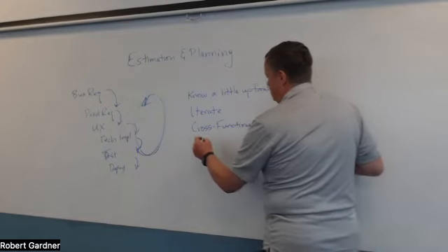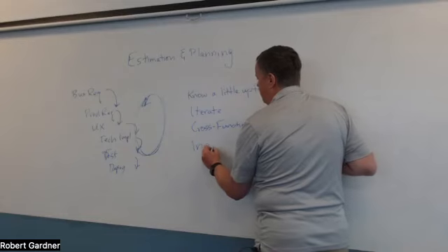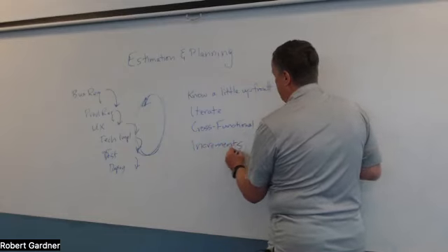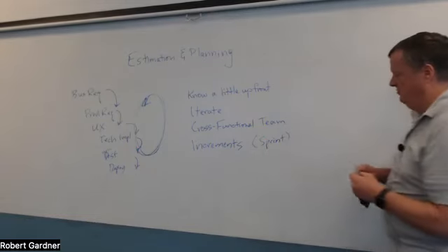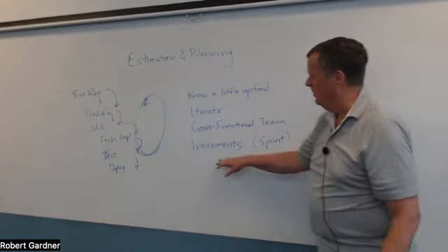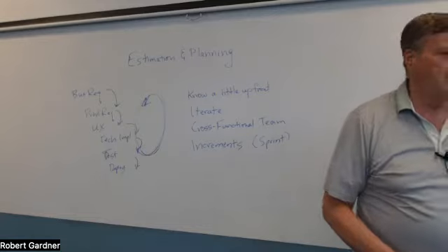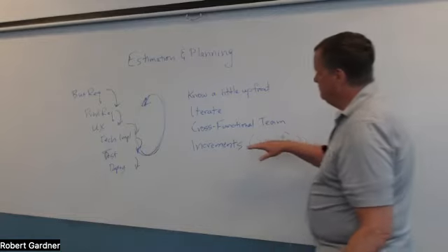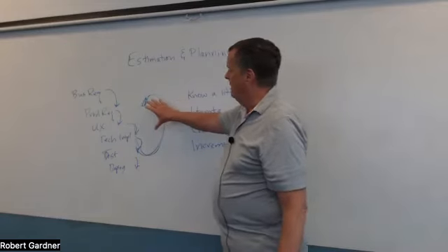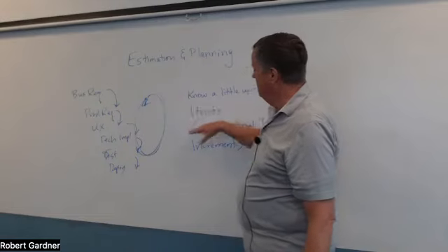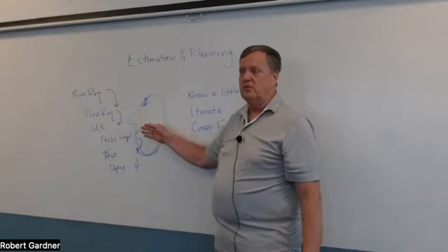And then you usually work in small increments, which they usually call sprints. And a sprint will be 1 week, 2 weeks, depending on the team. They'll decide how often they do these sprints. And so the idea with the sprints is that you figure out what work you're going to do over the next 2 weeks, and you get all your planning done with everybody on the cross-functional team. And then you start doing your implementation.